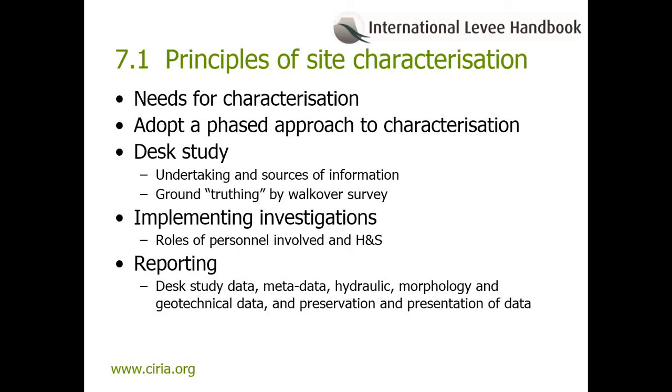Desk study. This is the usual starting point of the characterization process. Guidance is offered on undertaking the desk study, on the nature of the information that could be consulted. During the desk study, a walkover should be undertaken to ground truth the information as much as possible. Guidance is provided on the kind of things to look for during the walkover.